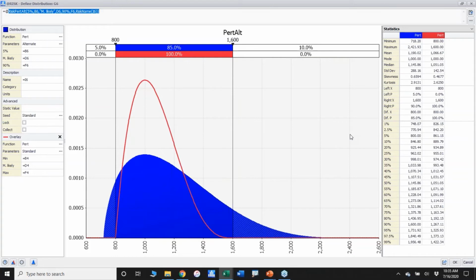If I did a sanity check with these values and went back to the expert that I'd gotten the original 3 inputs from, they probably would balk at that upper limit and go, holy cow, no way we're going to be that large. And you want that kind of interaction between you and the expert that's giving you this information. If you didn't clear that with them